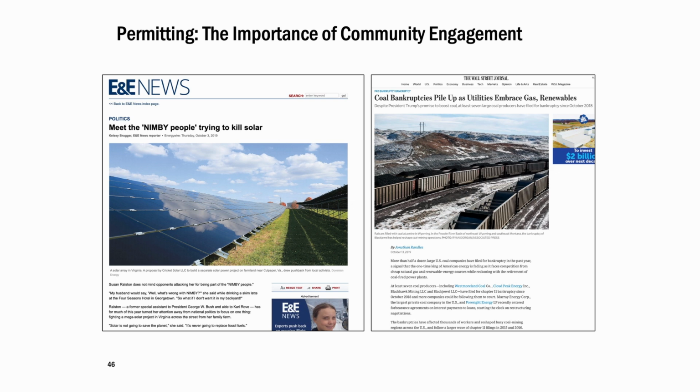So permitting is often the point during which local NIMBY and BANANA interests can surface. Because the permitting process can involve a period of public comment when locals, environmentalists, and environmental justice groups can get involved and say, hey, I don't want this plant built, and they can lobby their local politicians or community members to oppose the project.